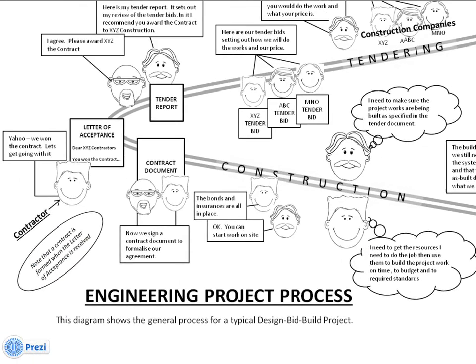So he will then instruct the consultant to send a letter of acceptance. So the consultant sends a letter of acceptance to XYZ contractors and says, you've won the contract, let's get on with building it. Once that's sent, there is a contractual relationship between the contractor and the client there, and we'll talk about that a lot more. It is a very serious thing being in a contractual relationship. It's like being married to someone. There's all sorts of conditions, there's obligations, and there's rules.